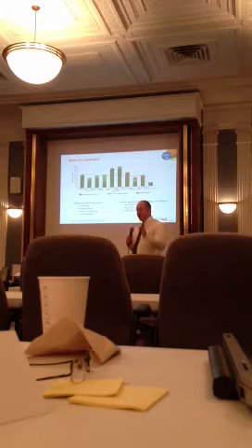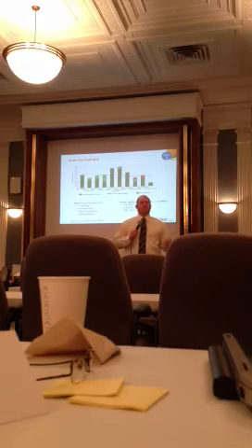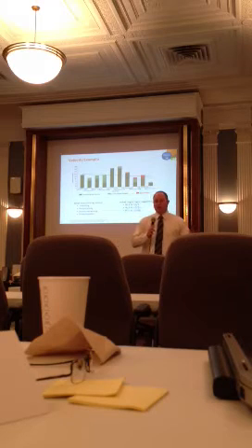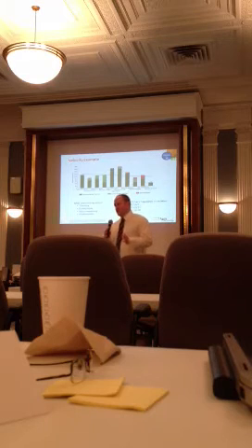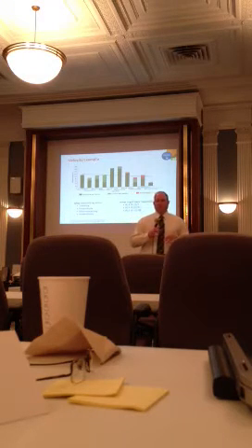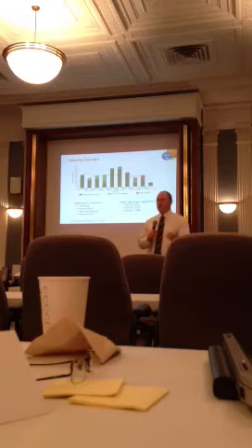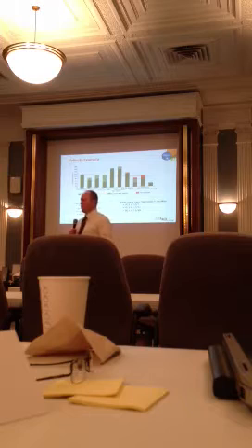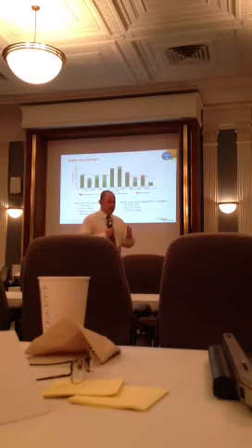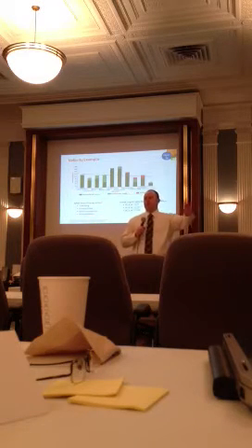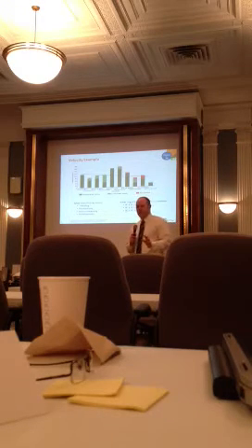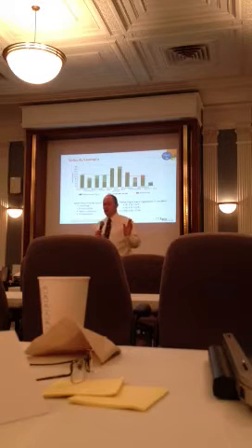So in an Agile world, any change that happens within an iteration we consider churn. Churn is bad, right? You commit to an iteration, and that iteration should not change. If they do want to change, then it would happen the next iteration. The one exception is if you're working on something and they no longer need it anymore, well, don't waste your time doing something that's going to be completely irrelevant. You just forget about it and handle it later in terms of cleaning it up or closing it out, depending on if you've worked on it or not yet.